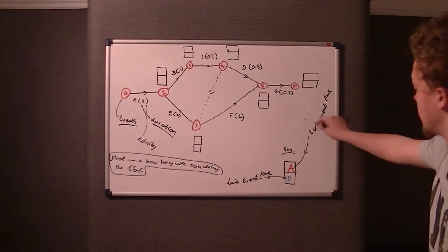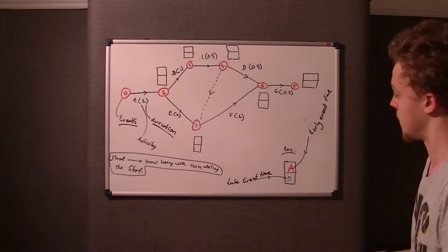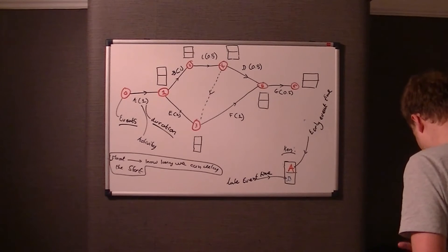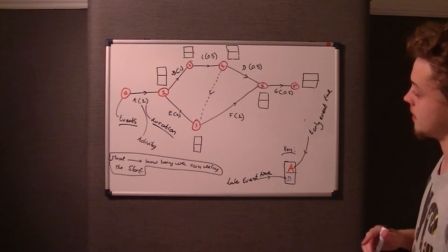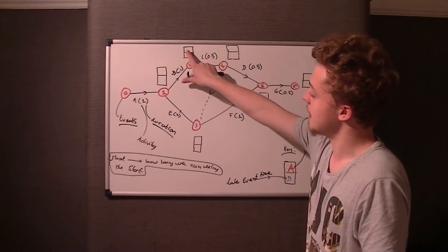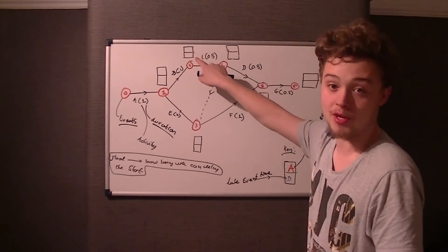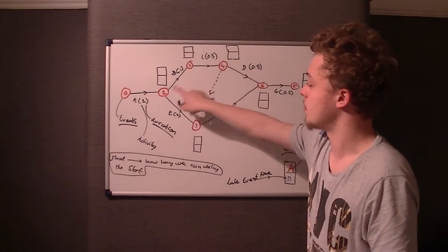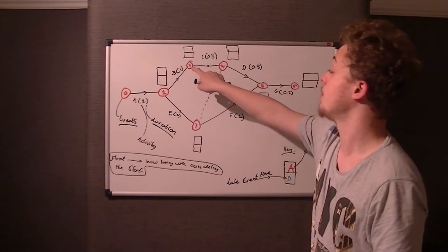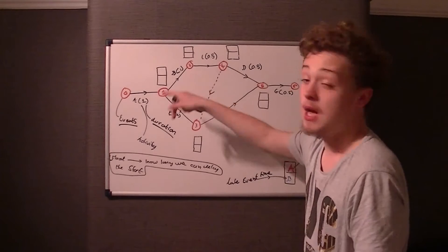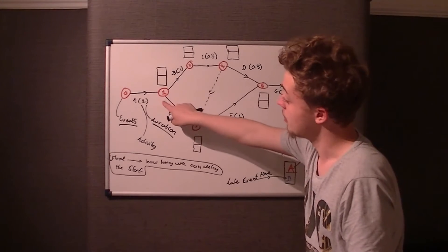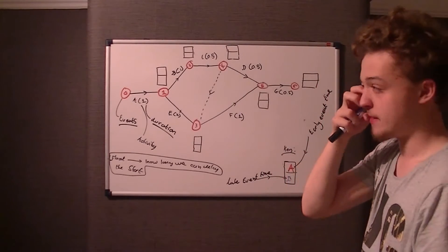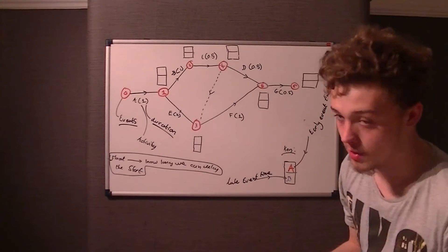To give more substance to the Early and Late Event Times: the Early Event Time simply means the earliest time you can arrive at the event with all the incoming activities completed. For example, the early event time at event two: you've got to complete activity A and activity B before you get to event two — you can't just jump to event two.